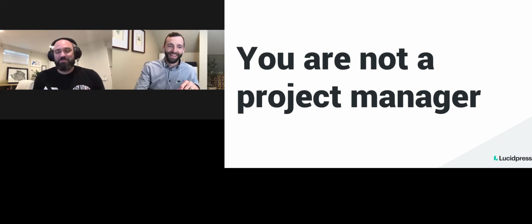And so I kept asking, we need more designers. We can't keep up. And what the partners actually ended up doing was hiring a project manager, which at first I thought, what are you doing? We don't need a project manager. But what happened was all of these requests disappeared overnight because we needed somebody to ask why. Why do we need this thing? Does this match our goals? Does this match what the client really needs or wants? And as soon as someone was there to ask questions and to push back a little bit, all of a sudden, all these requests evaporated.